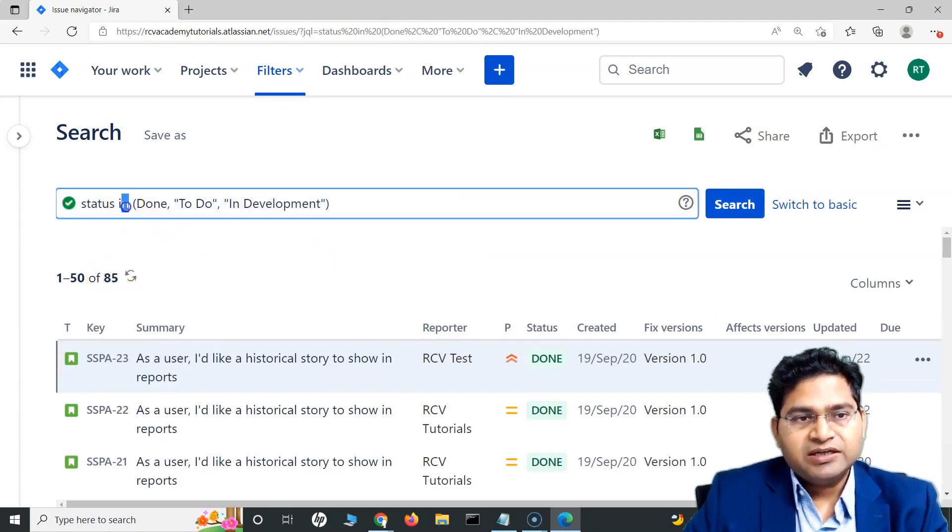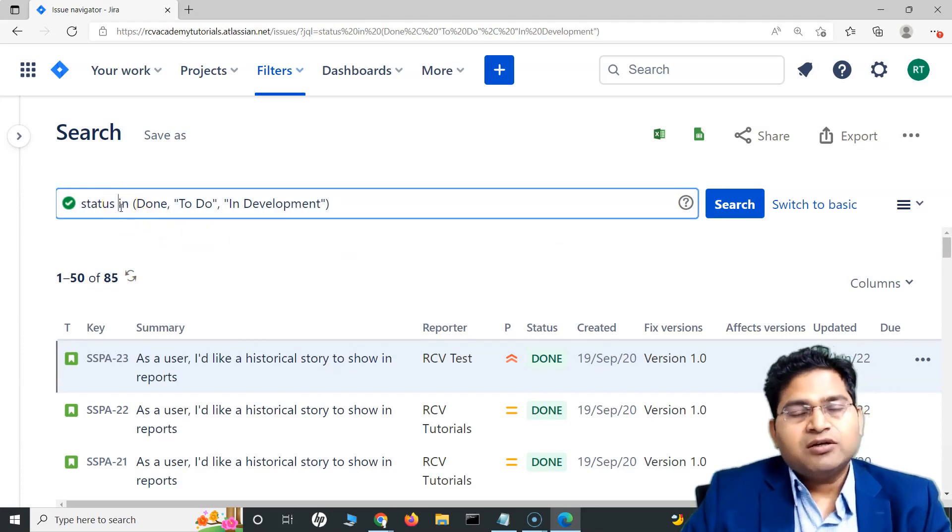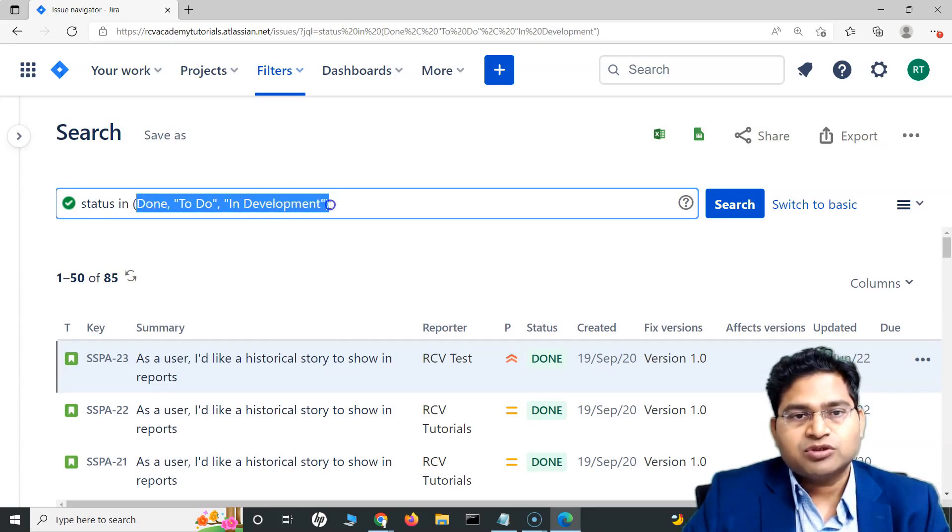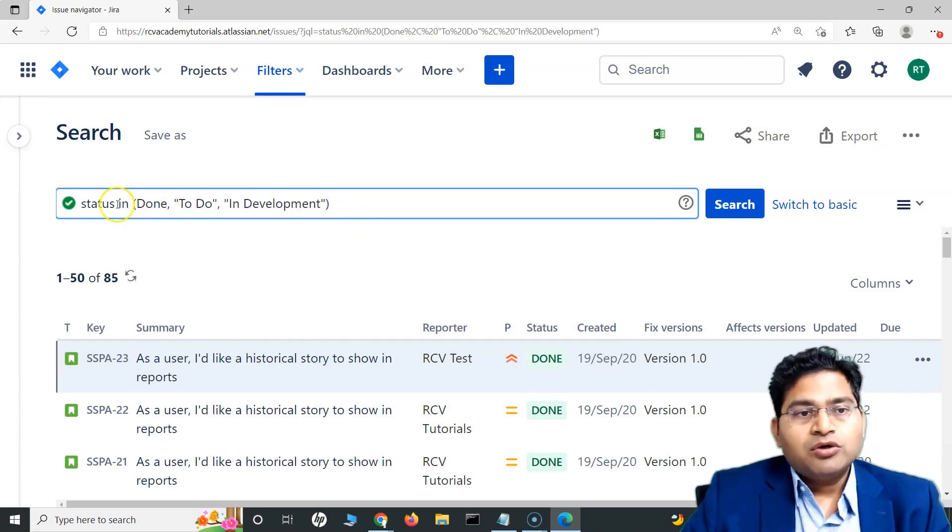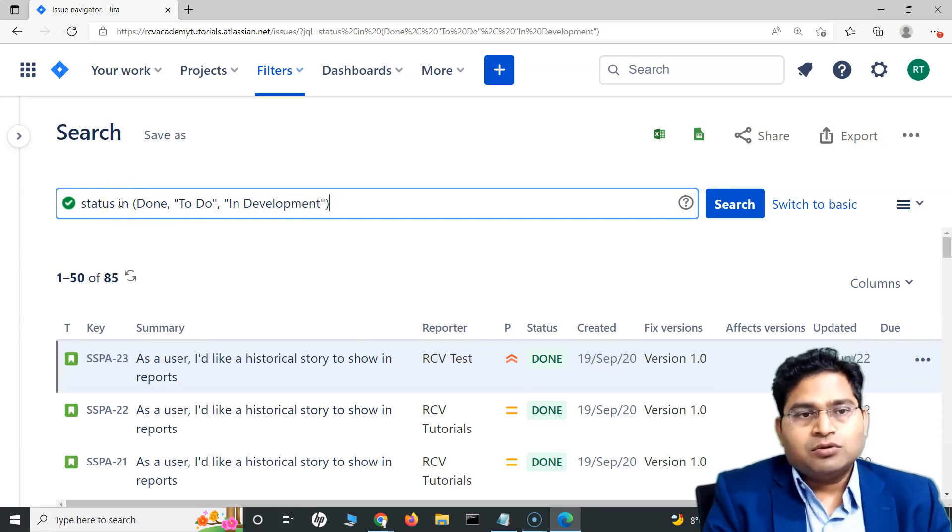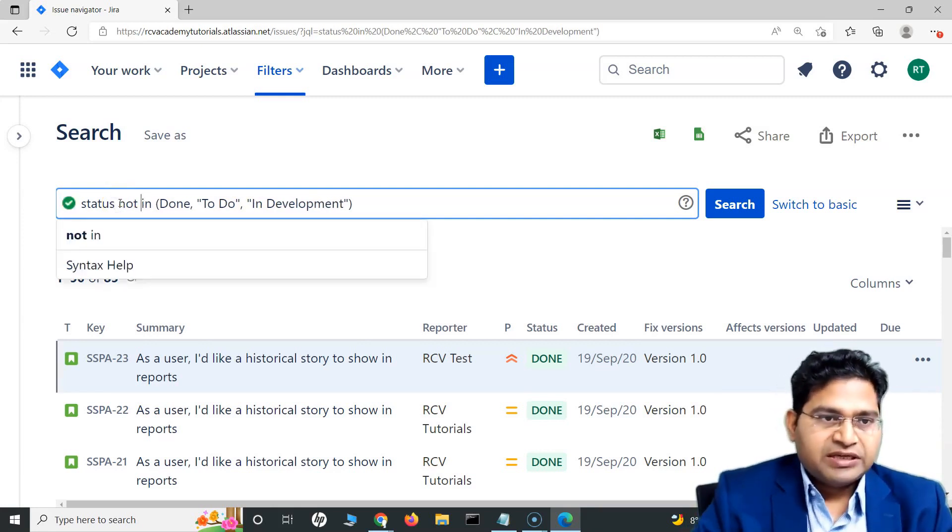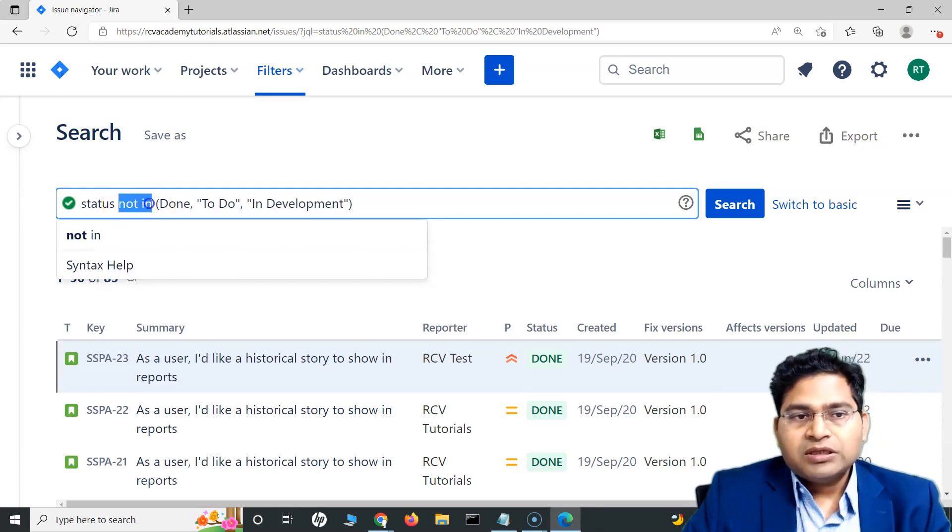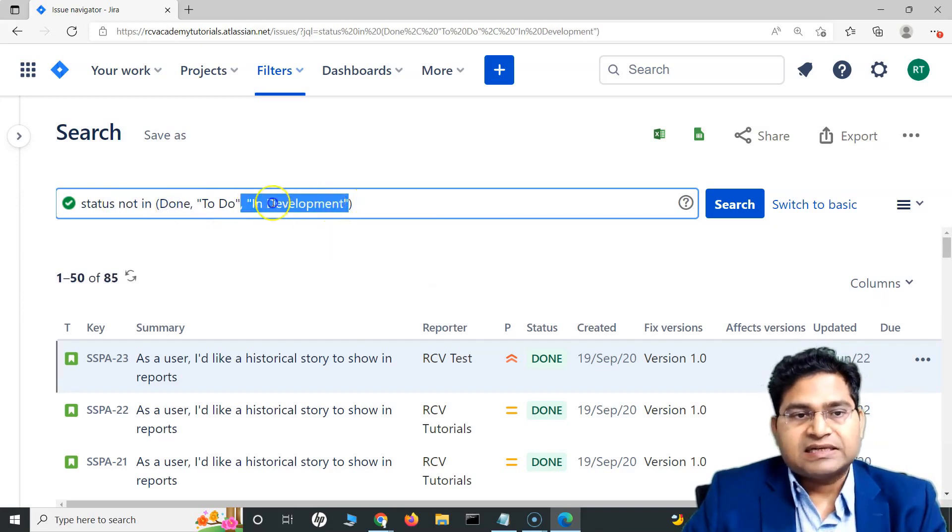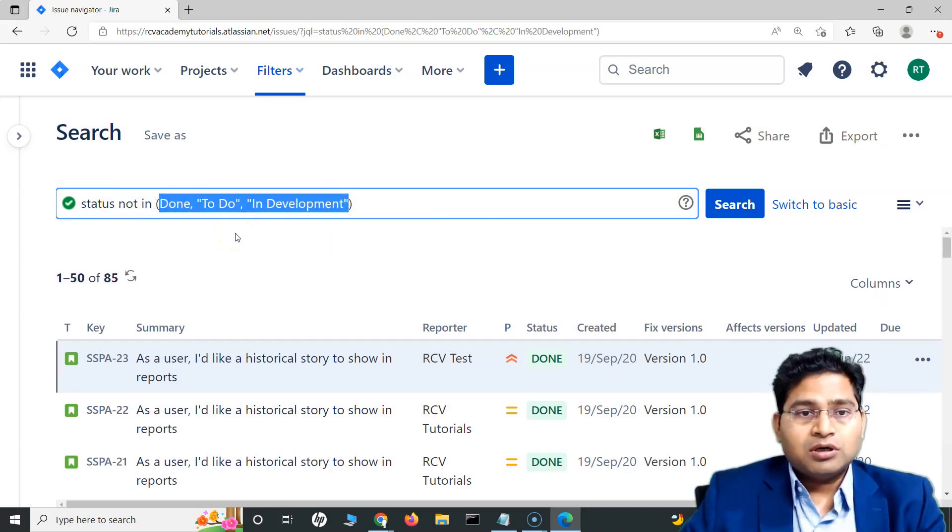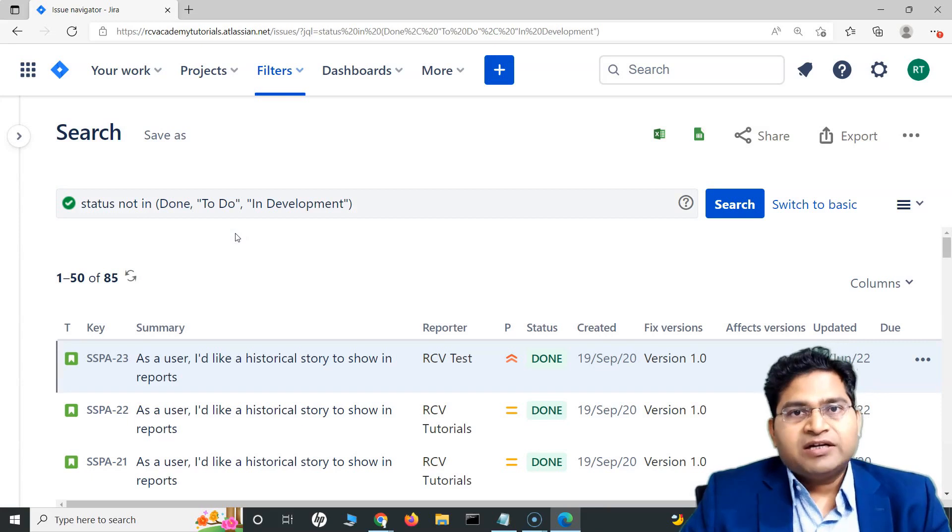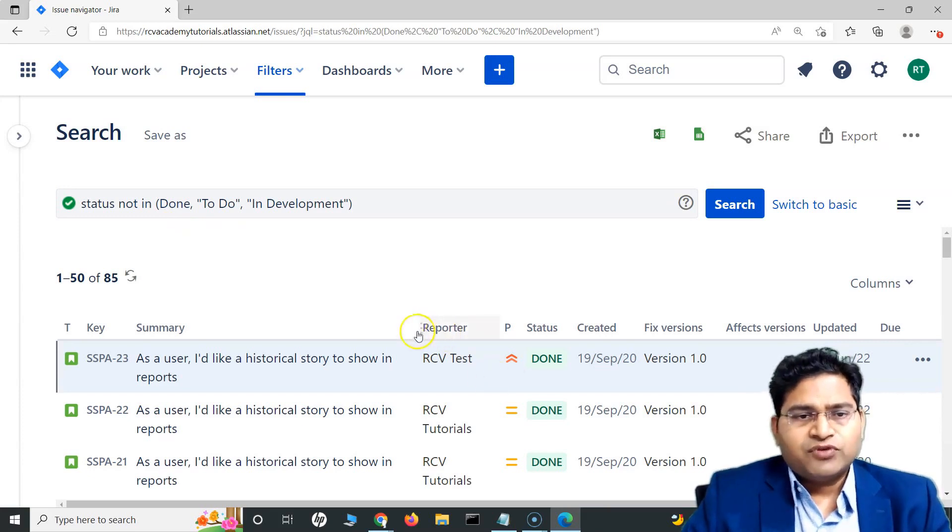What this in operator does is it will basically filter all the results or all the issues that match with the comma separated values that you will specify within the parenthesis. Now, what not in does is it's just exactly opposite of what in is. If I say not in in this place, what this will do is it will filter all the issues that are not in this particular three statuses. Instead of using or or or and combining and creating your query, you can use in and not in to quickly filter the issues that are either in the statuses or in any of the fields.